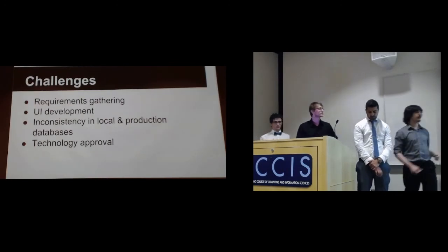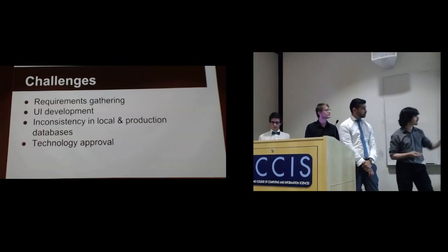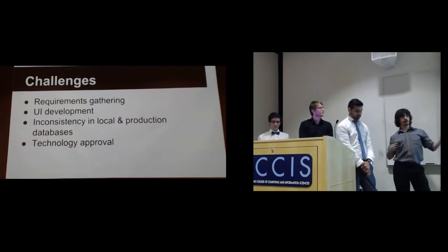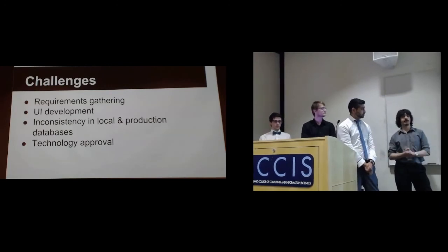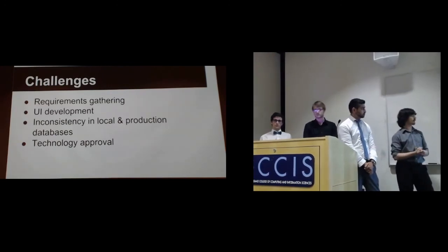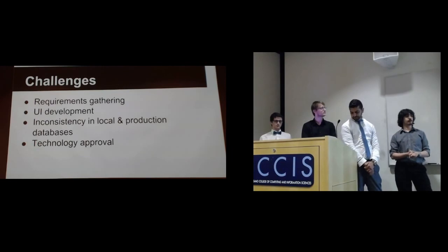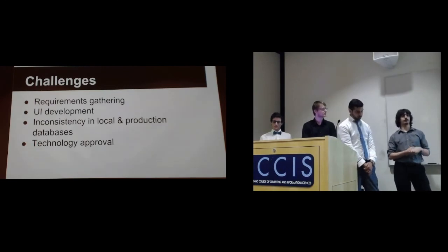So, like every project, we experienced some challenges, one of which was requirements gathering. Most clients that you interact with are not going to have all the requirements for their system that they want up front. And to mitigate this, we made sure that we met with our sponsor at least once every other week to ensure that what we were delivering and developing was what they wanted.